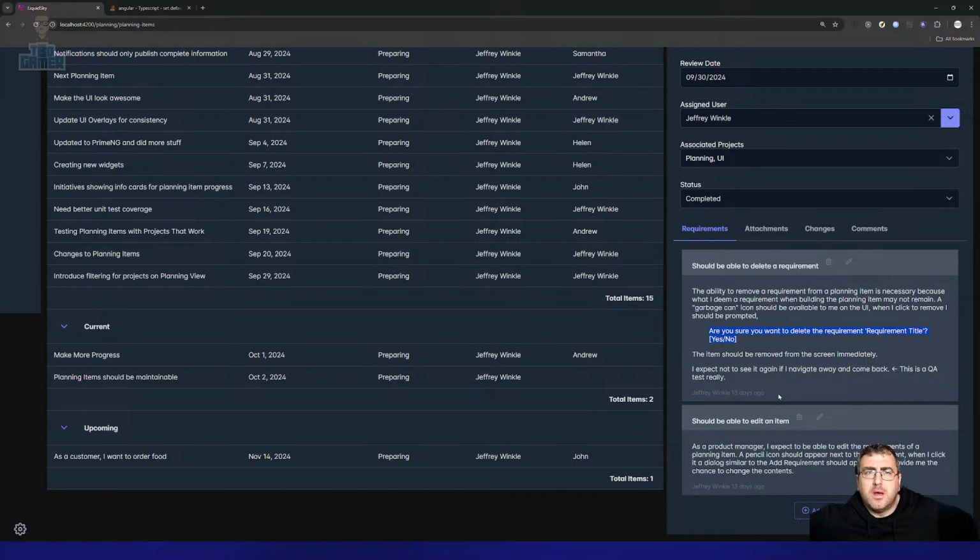Yeah. Manoj, I think the next step is to split the requirements into chunks that will fit into a sprint and be meaningful if possible. And after dev has the items split, maybe create the story. Only after the story is up for the next sprint are parts of it. We can estimate using agile poker or something, story points, etc., and work on it. So that's the goal. The goal is essentially these requirements can become one or many stories.